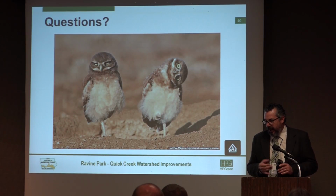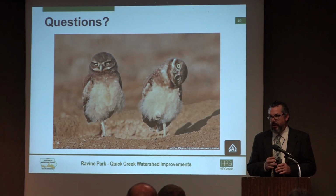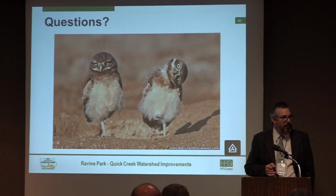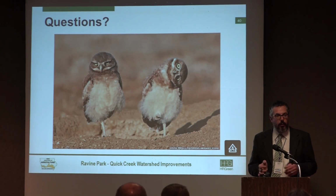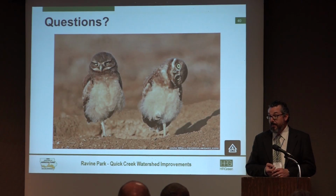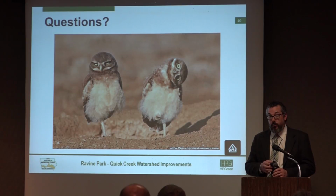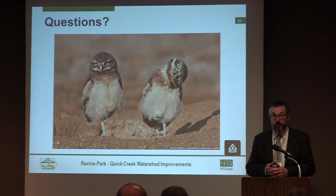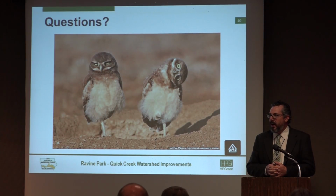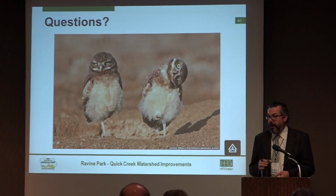Roughly speaking, Oak Savannah and Prairie restoration is cheap. It's really pretty cheap. We've only done a single phase of it, and they've spent maybe $20,000, $30,000, something like that. And again, we've only really done 6 or 7 acres. As I understand, the city plans to expand that out and do many more times that. The stream work is something like $300,000 or $400,000. What we showed was just 1 or 2 little areas. There's a couple dozen areas in total. The upland BMPs at the mall, I think our current bid for the contractor stuff starts at $400 and some thousand. Again, that's a couple of huge bioretention cells and then some native landscaping. Plus it's on a mall site, so it's a little bit pricier than usual.